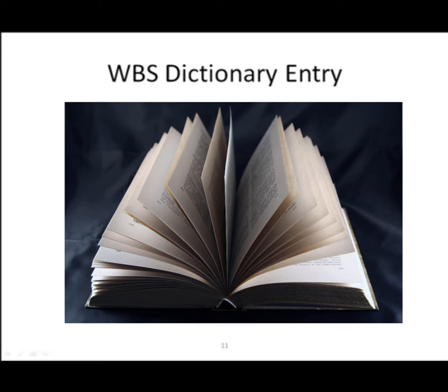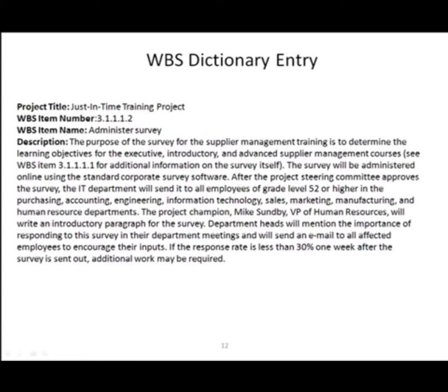It describes what is in each work breakdown structure element, and it may also say what is not in an element if it is unclear. The format can vary based on project needs. It might be appropriate to have just a short paragraph describing each work package, but for a more complex project, an entire page or more might be needed for the work package descriptions. I'm assuming that's what they probably used in that Winter Olympics project.